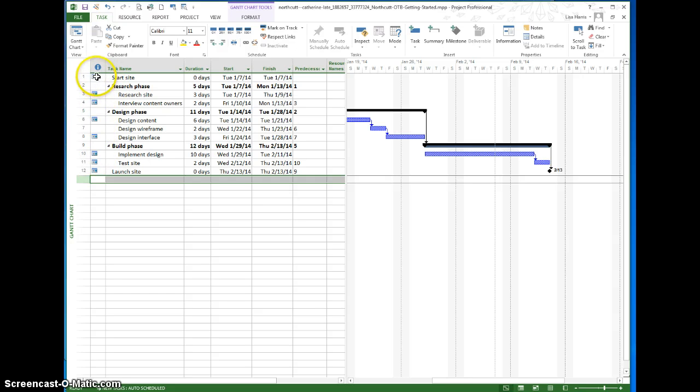Now the question is, how did these task constraints get in there? The only worry I have is, did you manually enter any of these dates? Be careful about that. You should never manually enter any dates. All you need to do is make sure you've got these durations set, your indentation set, your predecessor set, and then everything's just fine.